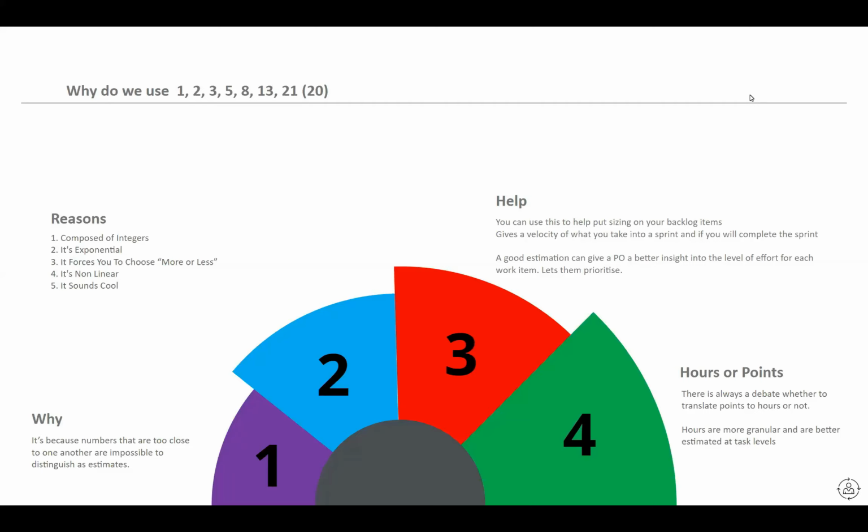There is no in between, and that's the thing that we need to look at. There's no in between that you can rely on. So this helps your team to group and differentiate the size of tasks. Rather than having 9, 10, 11, 12, all of those numbers in between, you only have 3 numbers to pick from. So you go, right, I think it's going to come out somewhere between here and here. And I suppose that's where I was coming from with that linear part, which moves on to point 4.